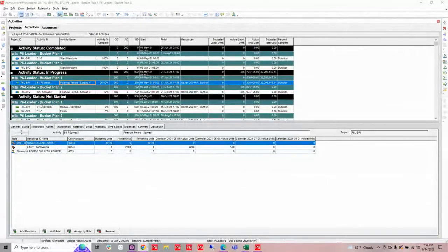And we just wanted the list of projects. So we use P6-Loader to take that out. We did a search and replace in Excel to change the area from one area to the next. So it was a name change, it was some code changes. And we were able to do that very quickly and grab the template that they use for those types of projects. So that's something Sue didn't show you particularly, but we can copy templates when we create projects.